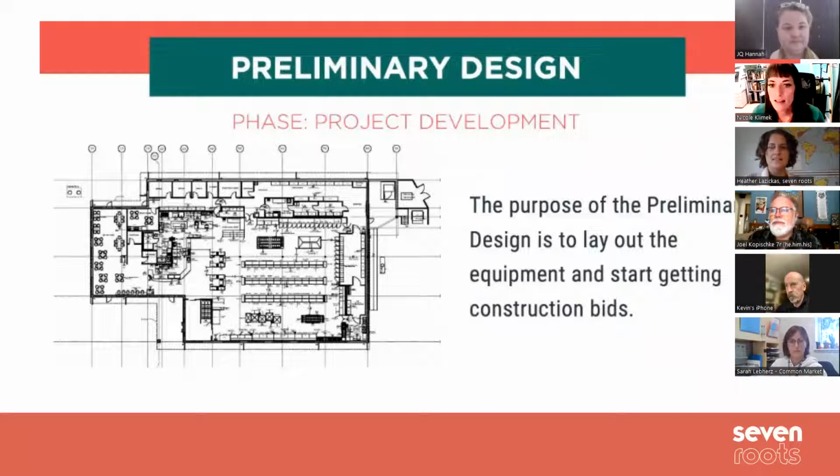The more I'm looking at this and thinking about it, you really do want to have your site selected, because even things like where you're orienting things matter. How's traffic coming in off the street? Where are the trucks going to be able to pull in? Those all factor in. In theory, we could guess about a lot of things and try to make something, but it would be somewhat of a work of fiction that you would then have to pay to redo once you have the details.